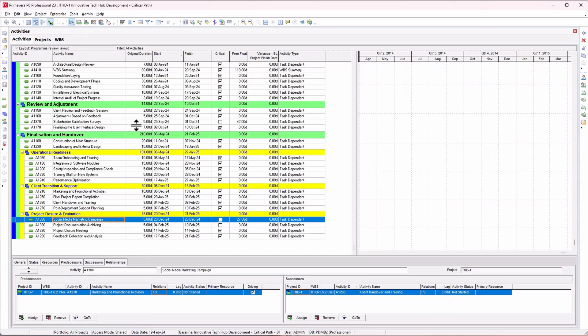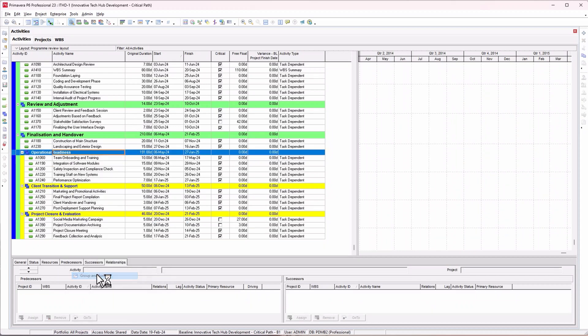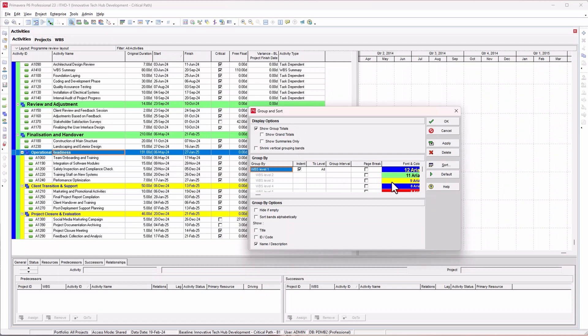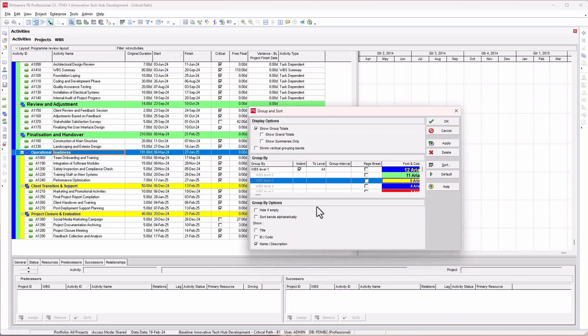There you have it. We've moved all the activities to our sub-WBS. You may be asking where these colors are coming from. Right-click and go to Group and Sort. The first level is blue, the next is green, and the last is yellow. That's why you have these bands in those colors.